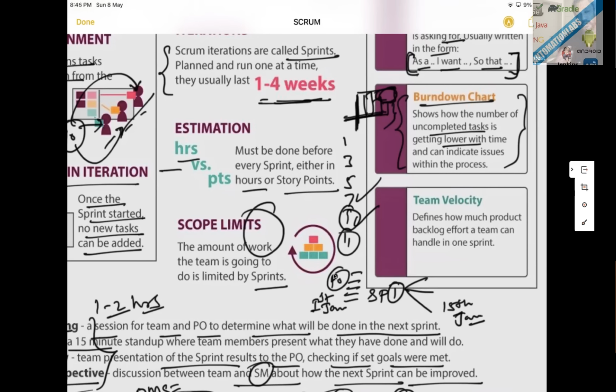So on the basis of that, you take the tasks, and most of the tasks you are completing. For example, let's say you have taken 60 story points and you have completed 60 story points on time. That's perfect velocity that we have to calculate. And then let's say out of 60 you have achieved only 20, it means 40 is still missing. Then on the basis of that, the team velocity will be calculated and decided.